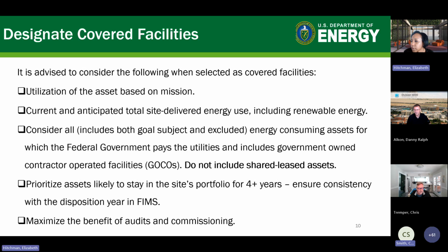When planning audits, consider setting up a 4-year project plan and schedule for assets to be evaluated each year, including the evaluation type, level, audit team, and estimated budget. Combine the evaluation with other types of walkthrough assessments, which we will go through, and with an internal optimization evaluation. Leveraging existing processes is important, and of course, involve the facility maintenance team.